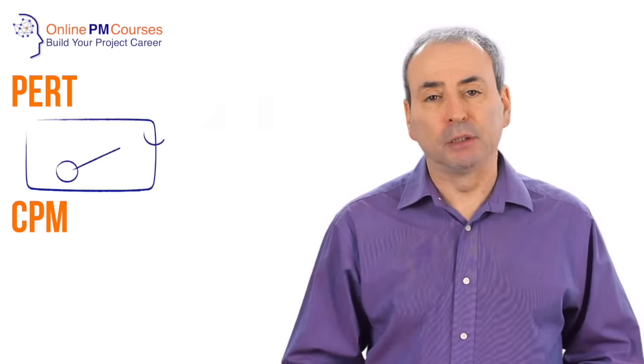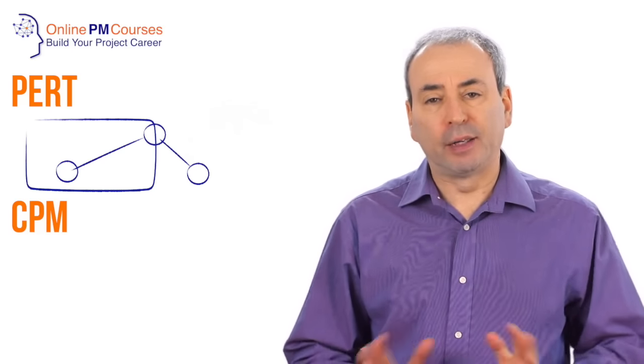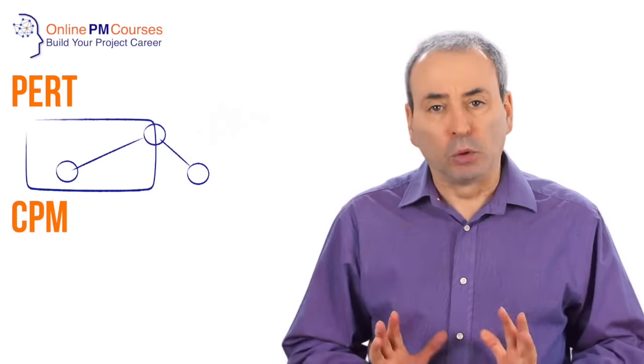The other principal difference between the PERT and Critical Path Methods is that the PERT method uses three-point estimates for the durations of activities, whereas the Critical Path Method, more simply, just takes a single-point estimate.